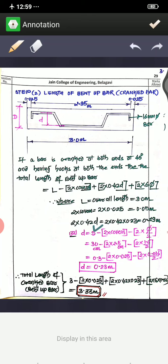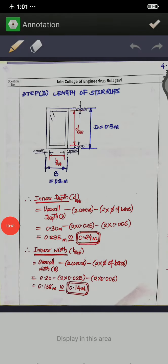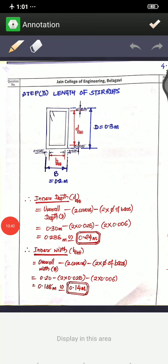So the total length of the cranked bar is: 3 minus two covers (2 times 0.025) plus two bends (2 times 0.42 times 0.23) plus L-hooks (2 times 6 times 0.016), giving a cranked bar length of 3.33 meters.